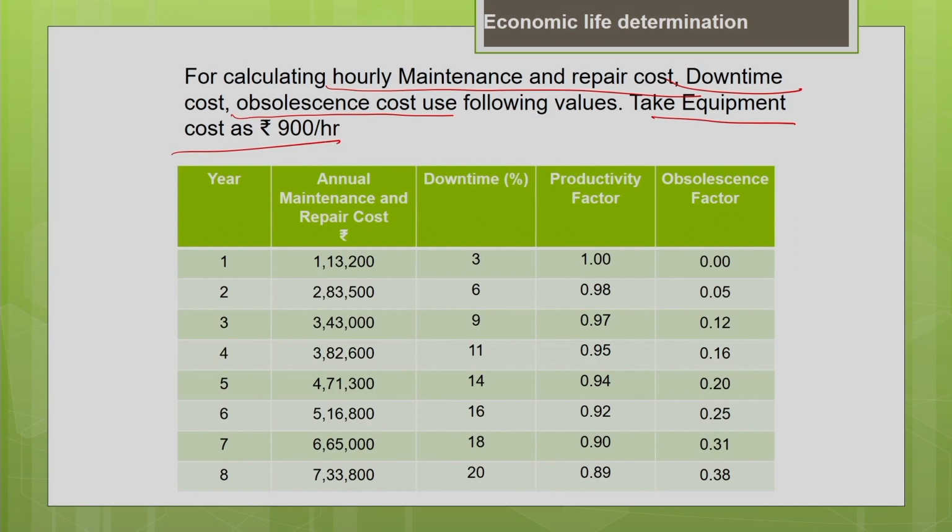Every year, the maintenance and repair cost is given for the entire useful life of the machine. You can see that the annual maintenance and repair cost is increasing with the age of the machine. As the age of the machine increases, the maintenance and repair cost increases.